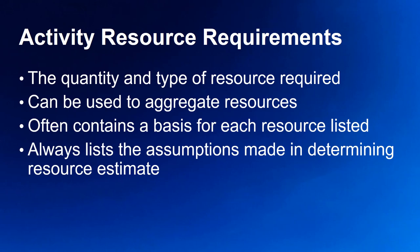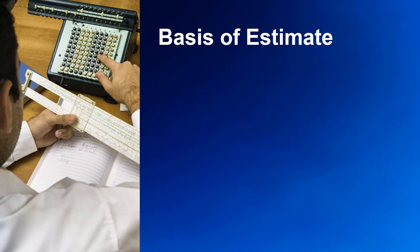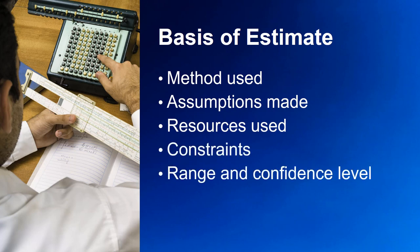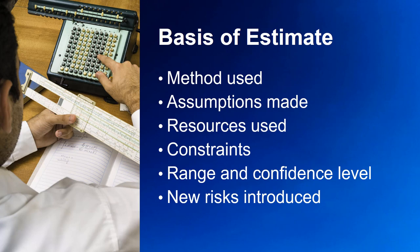The Basis of Estimates, or BOE, supports the Activity Resource Requirements. It is a key source for finding the methods used to develop the estimate — analogous or parametric, for example — and includes the assumptions and the type of resources used. It records whether there were any constraints affecting the estimate, and since estimates are predictions covering a range of possibilities, it attaches a level of confidence to each. It also captures whether the estimating activity revealed or introduced any new risks.